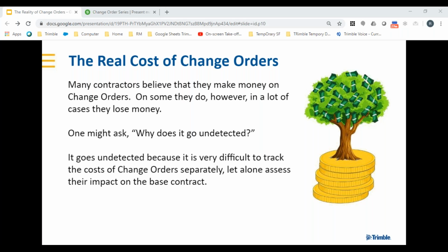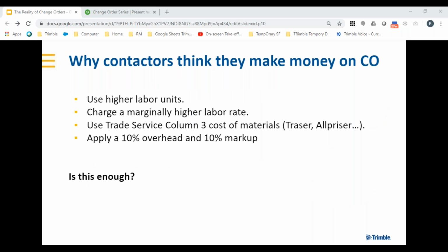We know that the field's handled it, and we don't even think about it. We don't go back and track to see how much impact that might have had, the ripple effect on the project. Like I said, everybody's going to get a piece. A lot of times they're coming to you for that change order because they've already gone to the engineer, and the engineer's told them, I'm going to charge you X to redesign that or put it on a drawing as an addendum. So instead of paying them, they come to us, issue us a change to do that, and then require us to do that to the drawings so that we can get through our inspections and, of course, get our as-built and do that heavier work on the back end of that. So, again, make sure you put those elements into your pricing proposals.